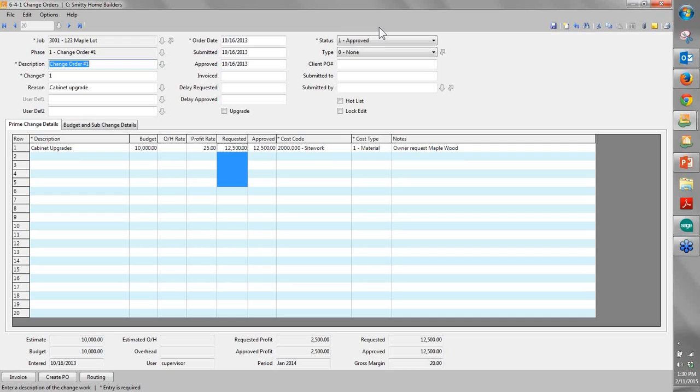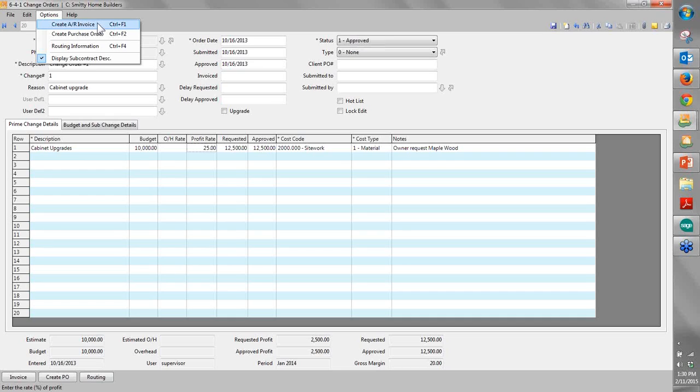Now, in this particular screen, we only see it really in residential contractors where they want to get a check if they're going to do this additional work for the home builder and for the homeowner. Over here, we just click on one button that says Create AR Invoice. It creates an invoice. We can attach that invoice with the change order, and they both go together, and we can get moving from there. So it makes it very simple whether I'm going to add the change order to a loan draw or if I'm going to bill it directly, to do either one through this process.